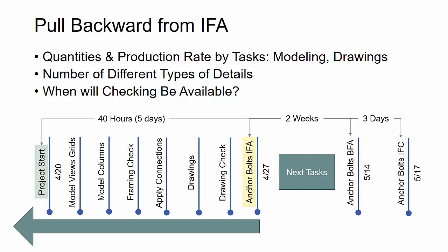So if you see on your schedule that both are required and you can't do them in sequential order with the same resources, again, you need to identify that, go back and talk with the general manager and the lead and the fabricator and see if you can get some room to adjust to that or pull resources from other projects. Now, when you do things like that, you just need to make sure that the general manager that's mapping out all of the jobs on the projects across your organization understands those changes, and if it creates new pockets or holes of hours in other areas that he wasn't expecting before. So this is all a big part of the scheduling aspect and the hours verification in the lead detailing process.